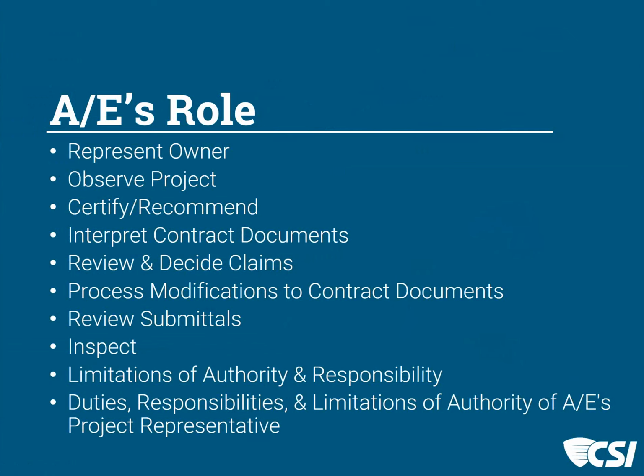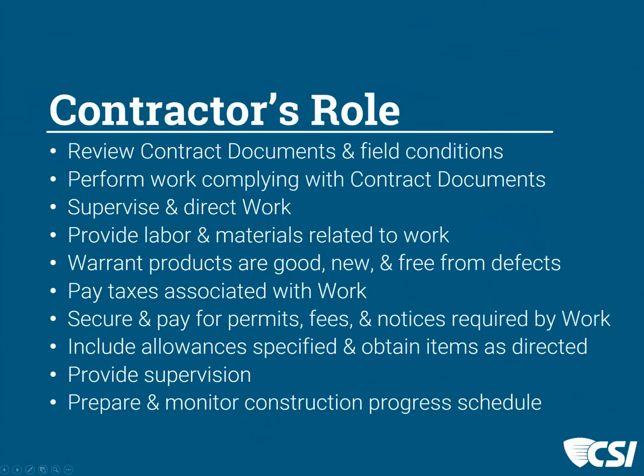We also have an additional comment that came in from Chuck. He wants to clarify, architects do 2 inspections, one at substantial completion and one at acceptance. All others are observations. That's exactly right. We inspect twice. Well, we're supposed to. You're exactly right.